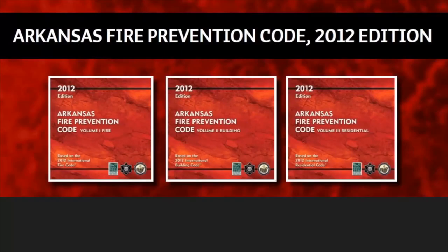Another key takeaway was to evaluate code issues early. So we met early and often with the university and state fire marshals beginning in pre-design. And this project would be a pioneering use of mass timber in the state for a student residence hall. And we wanted to make sure that everyone was on board with and understood, and that all concerns were vetted early in the process. So the local fire marshal made it clear that they would not entertain any variances for this project, which ended up influencing key decisions around construction type and concealed spaces.